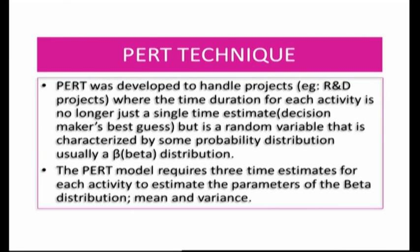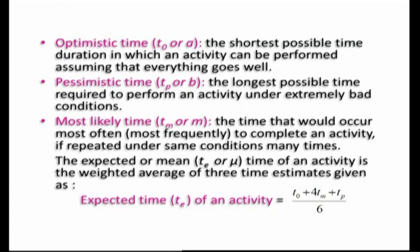The PERT model requires three time estimates for each activity to estimate the parameters of the beta distribution, which are the mean and variance. So far we have been using just one time estimate for each activity, represented in brackets next to the activity in the network diagram. In PERT, we will have more than one time estimate for each activity. The three time estimates are the optimistic time, the pessimistic time, and the most likely time.